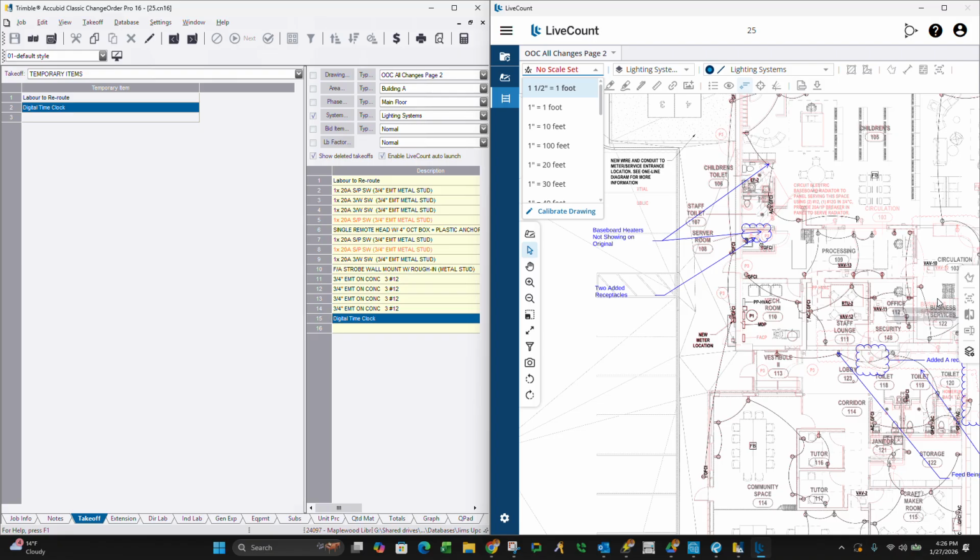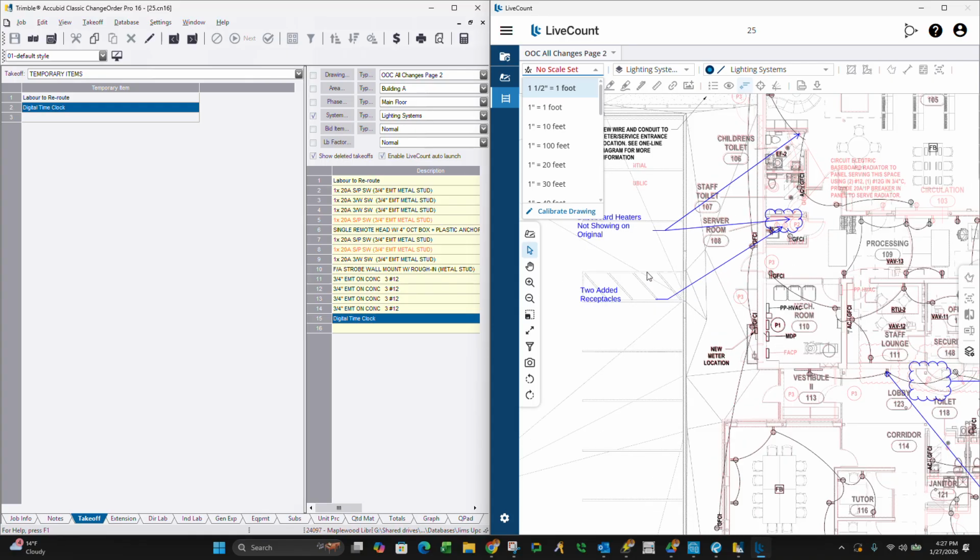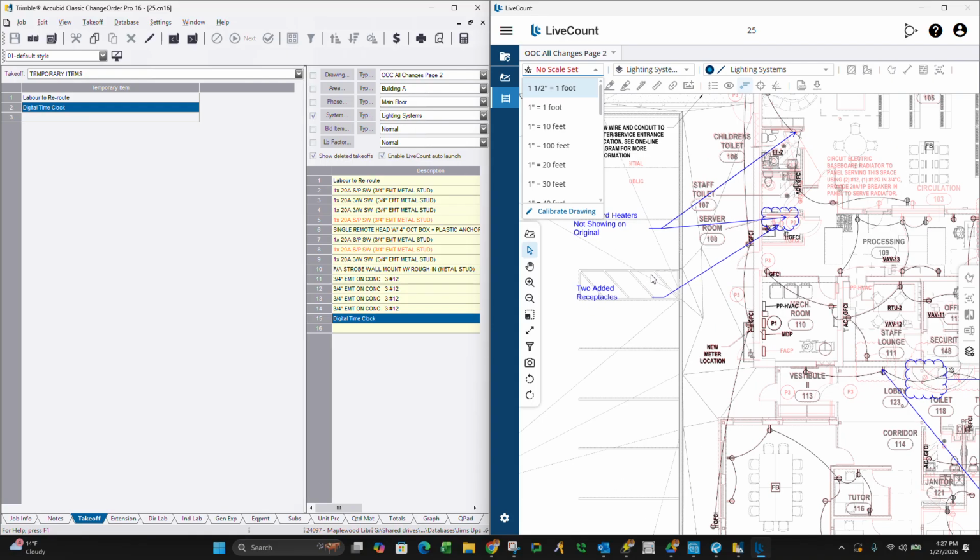So if you put this on here, you're better off putting more than less. If you're the estimator doing it, the project manager is always going to know more about what's going on with the project. If you add more, he can take it away. If you add more and it gets approved, great. If you add less, it doesn't work out. It's better to add more.